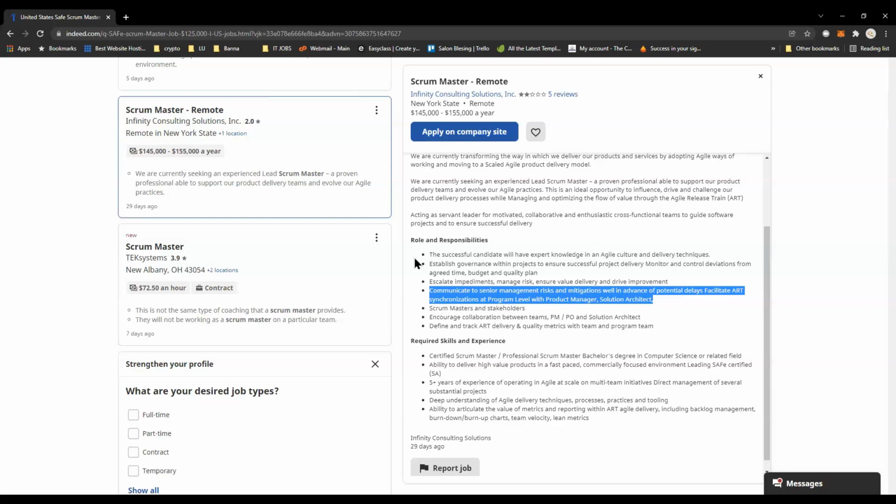So when I go to the Scrum of Scrums meeting, that's the first thing I say: hey guys, we committed to this objective, but after working with the team and the PO, we won't be able to make it because we lost 2 people in our team, and we are still going through the hiring process. That is an example.